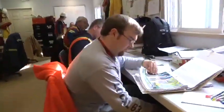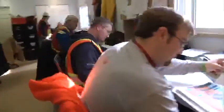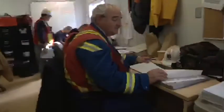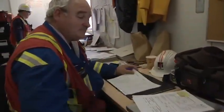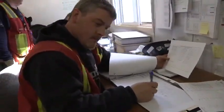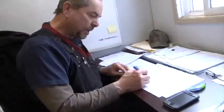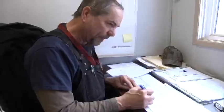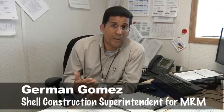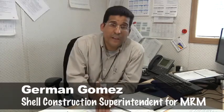Is each man able to get his work done? Well, that's why you have foremen and lead hands and their paperwork. These folks take each worker's timesheet and correlate work done with task assigned and project objectives each day. They gather and input information so leaders can know how the job is going. His time that it should be charged to. We can check, for example, productivity. Maybe we have a problem with productivity because the guy hasn't received the proper training to do the activity, so it's our call and our responsibility to provide proper training.